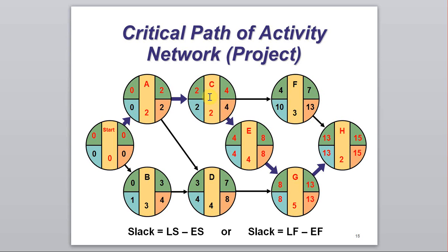On the other hand, if Agent is taking activity C and asks for 2 weeks of leave, because the early start time and the latest start time are both week 2, either you get a backup for Agent, or you ask Agent to take leave after he finishes his activity, because the delay of this activity will delay the whole project.